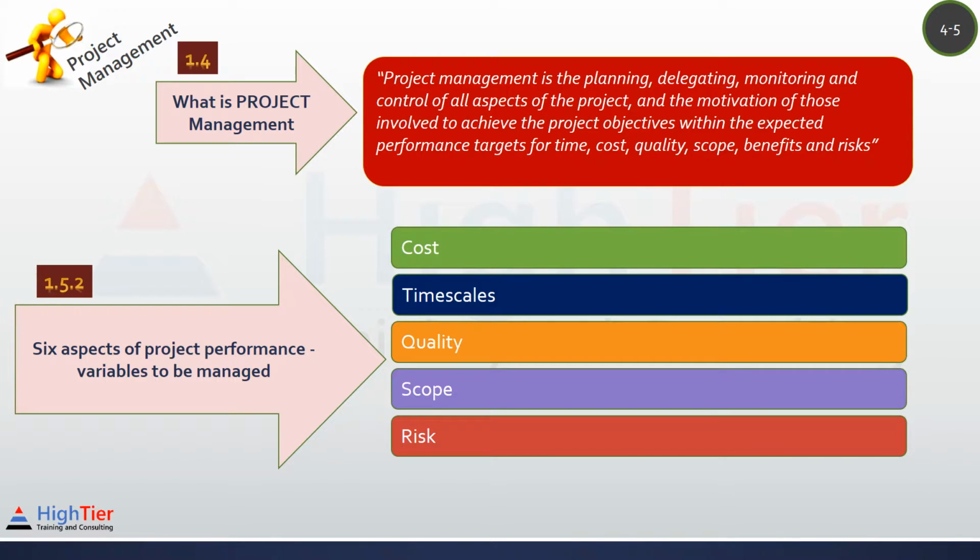Risk. All projects entail risk, but exactly how much risk are we prepared to accept? If building the house is likely to affect a protected area or site, the planning authority may not grant planning permission if it damages a protected area or site.